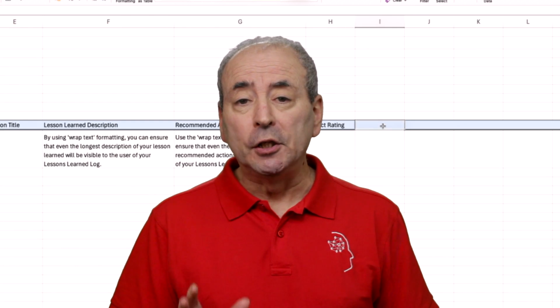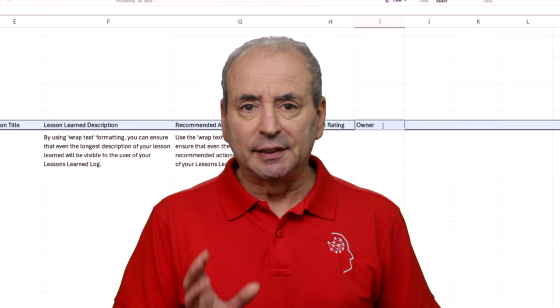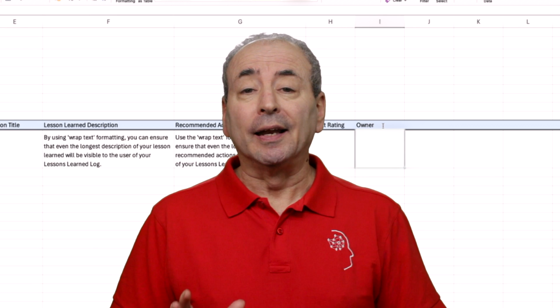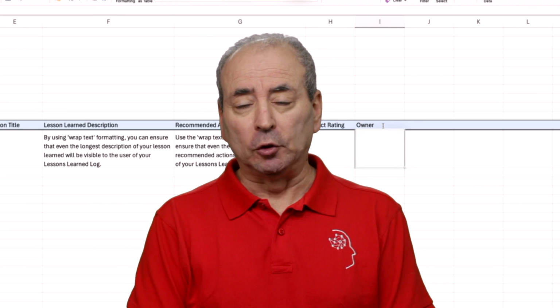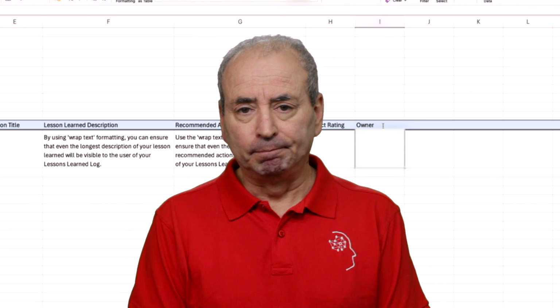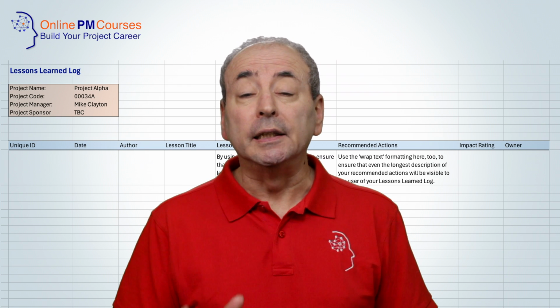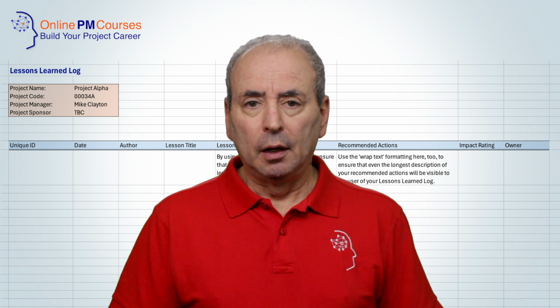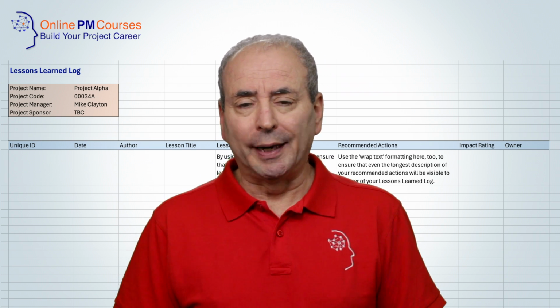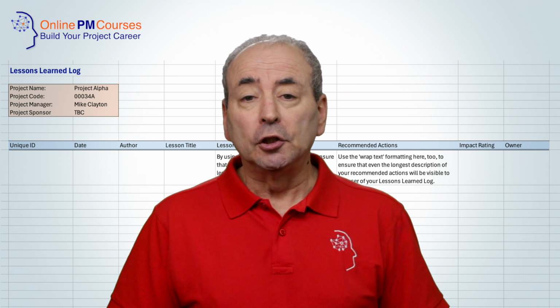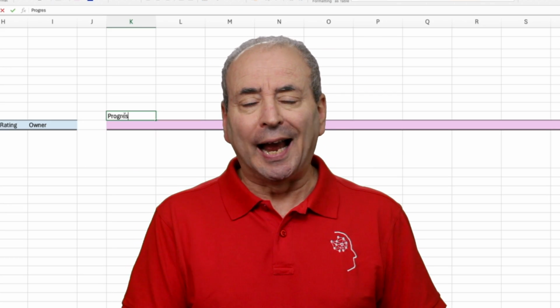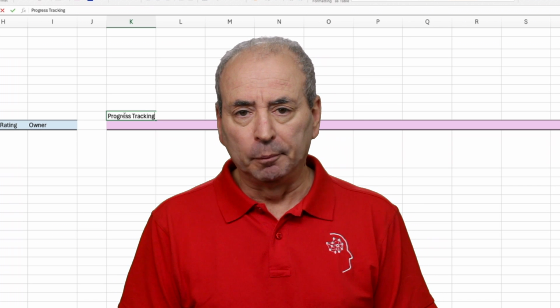The next one is important to me. Wherever you have an action that you need to take, you should also allocate an owner who is responsible for taking that action. This is your basic lessons learned log, but you may also want to create a number of columns to track progress on the actions that arise from your lessons learned.